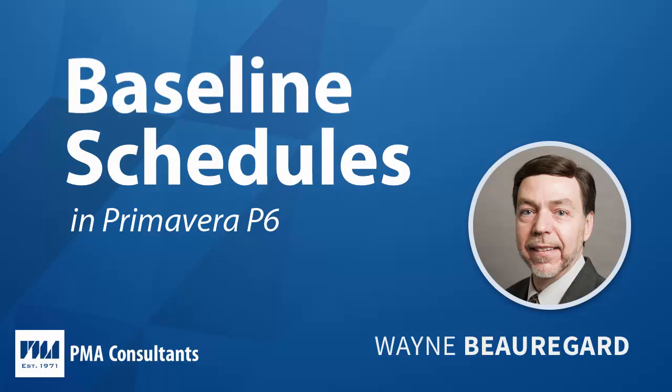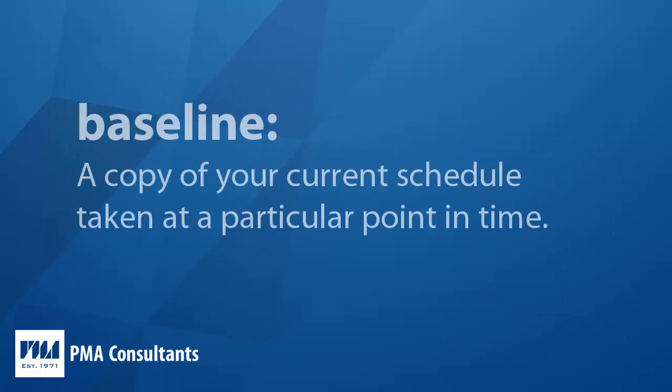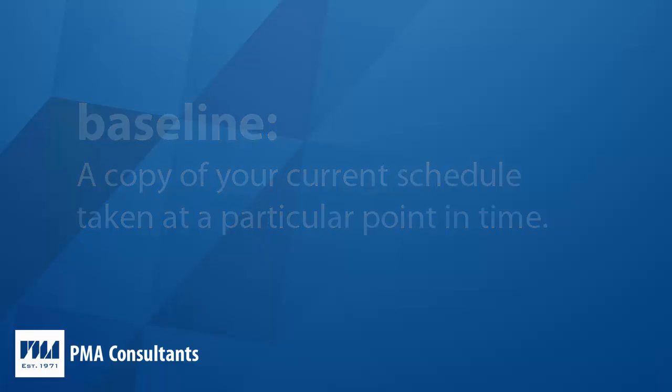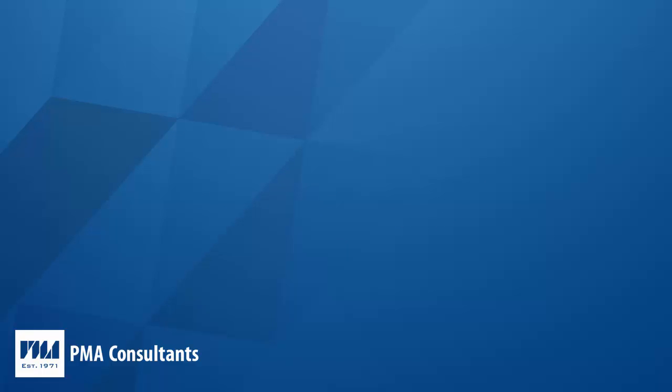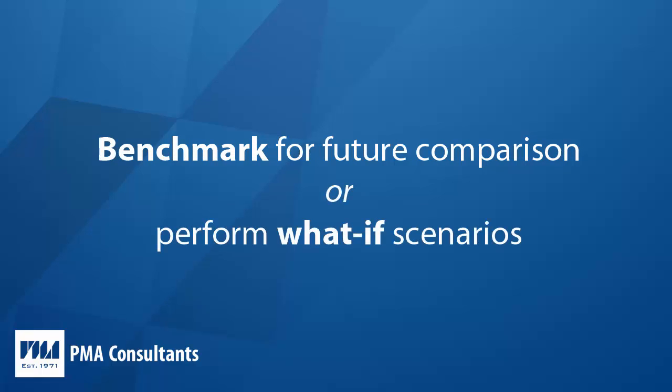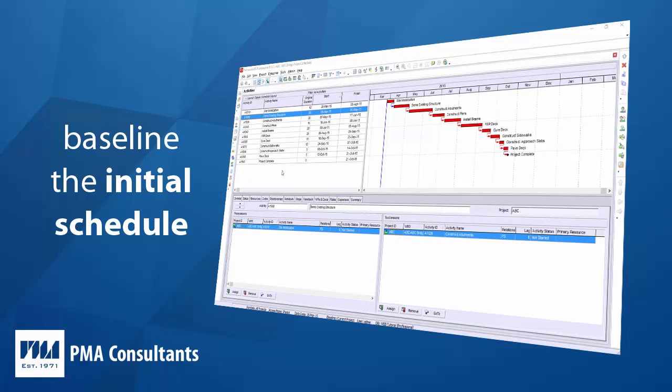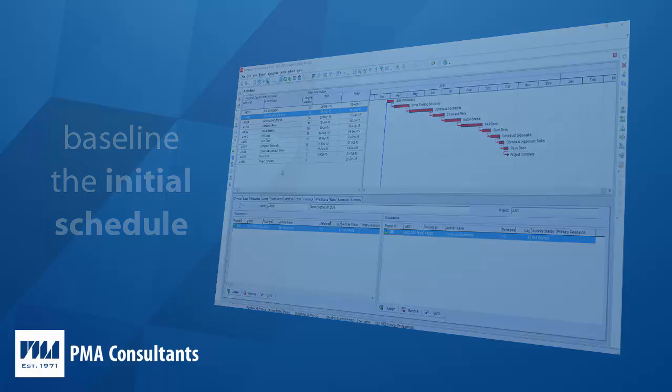For those not familiar with the term baseline schedules, it is simply a copy of your current schedule taken at a particular point in time. You typically create a baseline at the point during the project when you need a benchmark to compare future progress against or to perform what-if scenarios. A good example would be to baseline the initial schedule so you can measure performance as the project progresses through time.